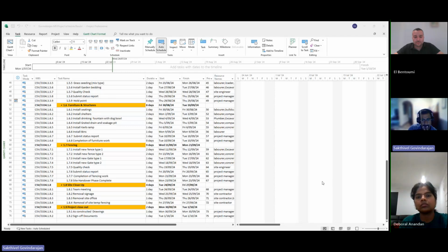Every week I plan Monday to Friday to meet the timeline within the budget. In case any discrepancies or backlog occur, for any predecessor or successor, I can put additional resource to complete the task, even Saturdays or afternoons, like after 4 to 6. That's the plan I made for the project schedule. You guys have a look. If I need to do anything, you are welcome to give your valid input or feedback regarding this project schedule.